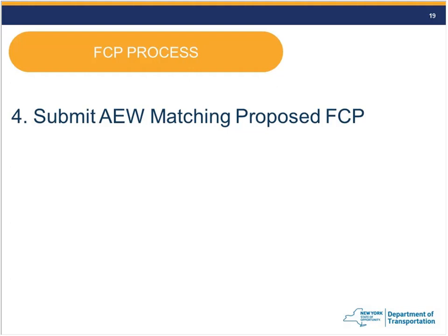The thresholds are applicable based on the original bid quantity. Quantity thresholds are not dependent upon the category. It's the original bid quantity, and then how you spread it amongst the categories afterwards is up to however it played out.